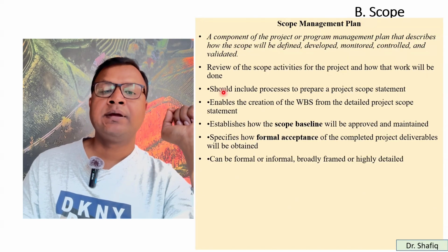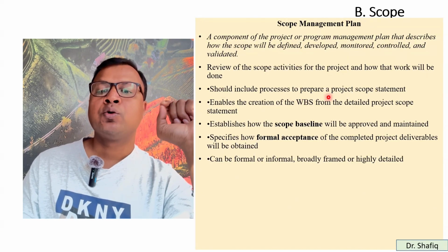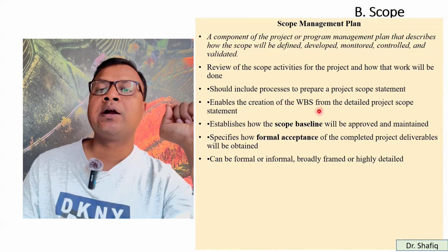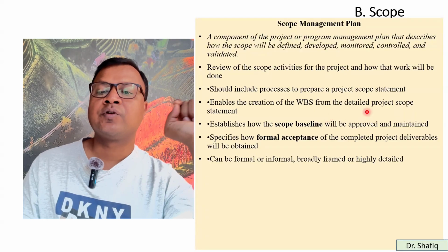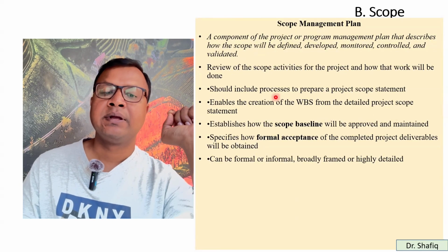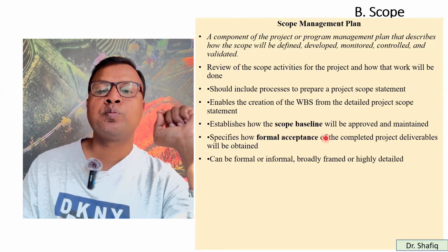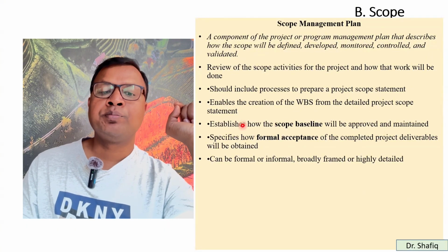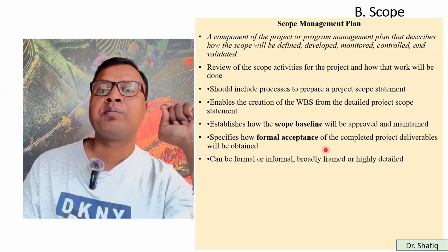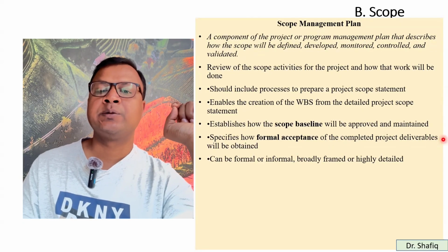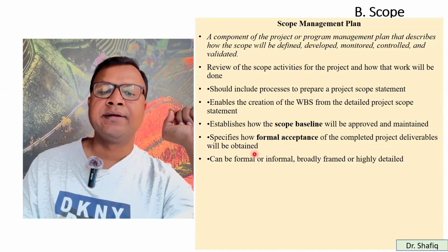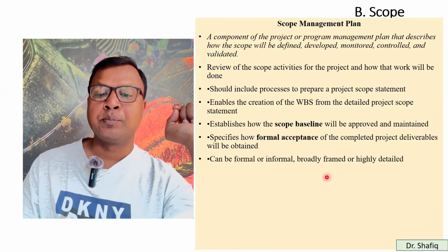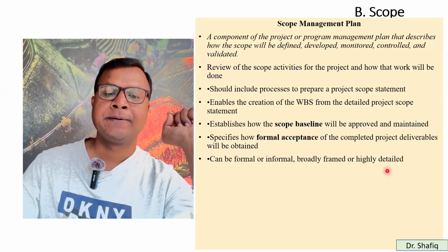The scope management plan should include processes to prepare a project scope statement. It enables the creation of the work breakdown structure from the detailed project scope statement. It establishes how the scope baseline will be approved and maintained. The scope management plan also specifies how formal acceptance of the completed project deliverables will be obtained. And the scope management plan can be formal or informal, broadly framed or highly detailed.